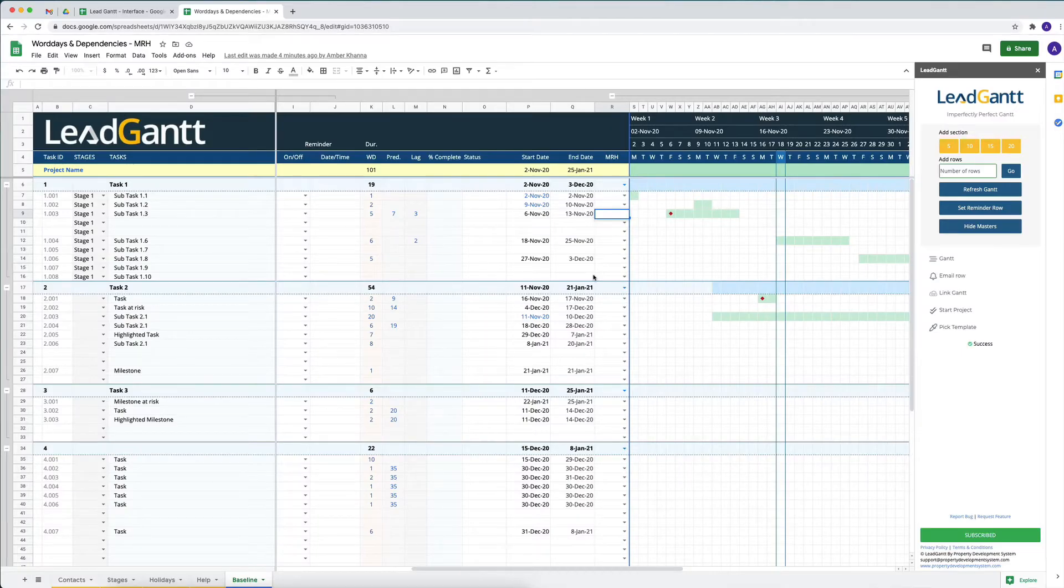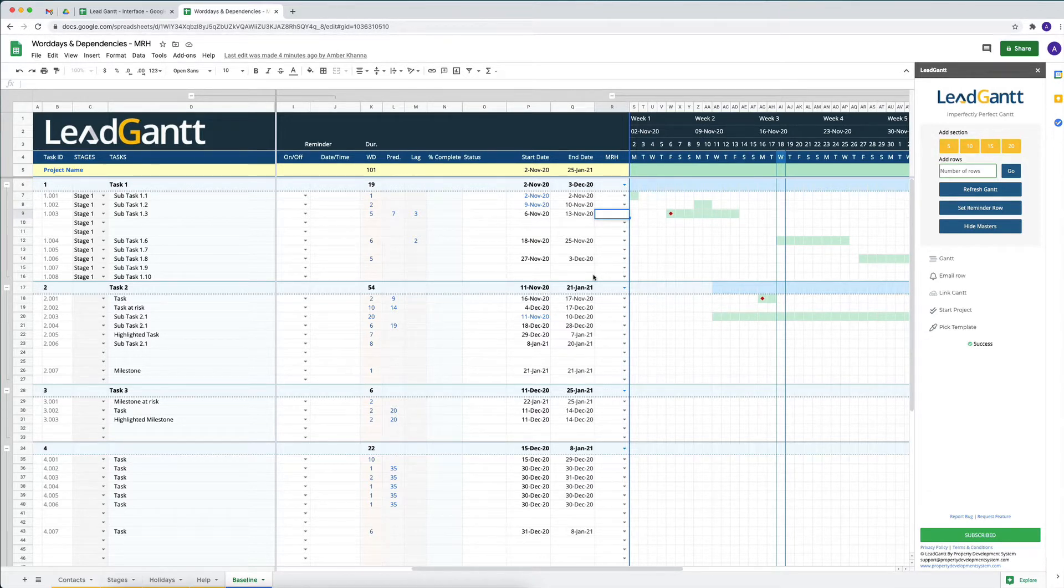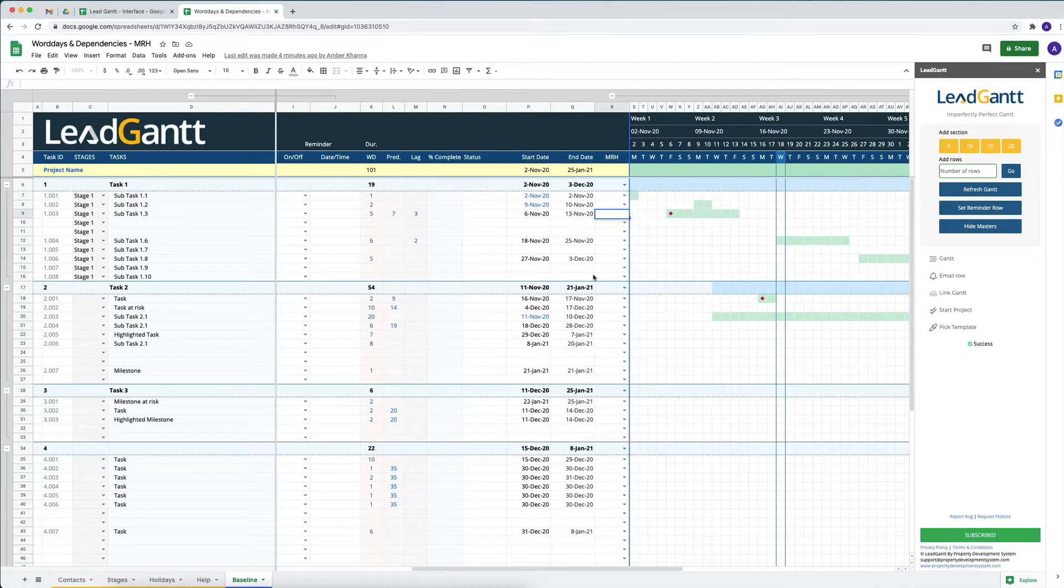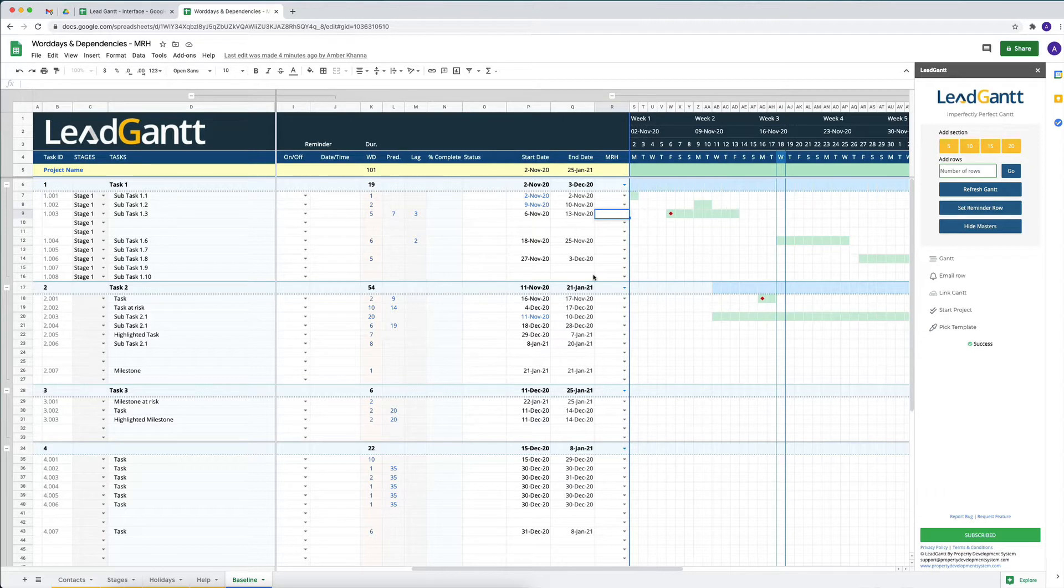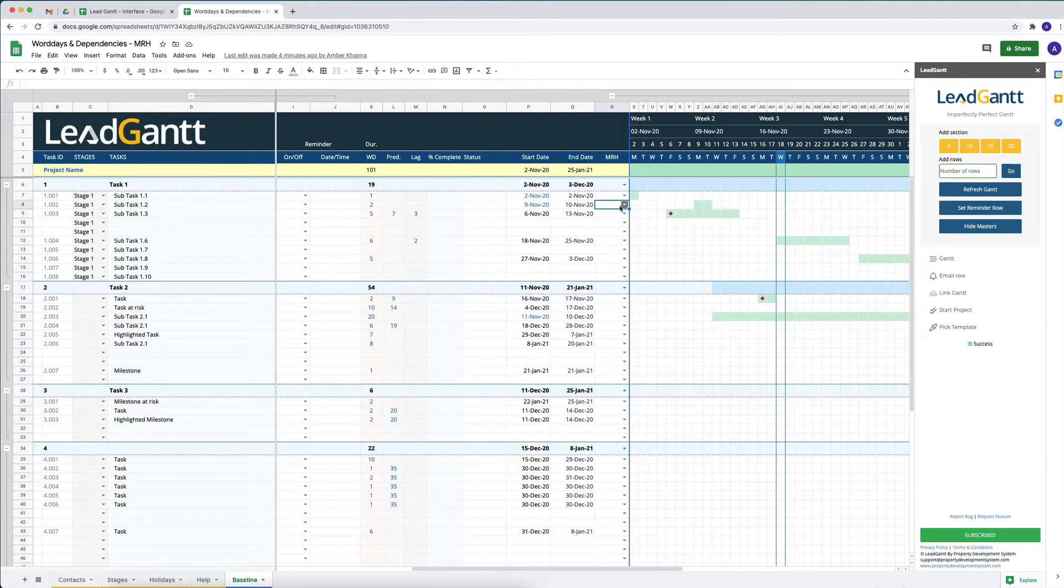When we are running a project with a team and we want to highlight a certain task that needs attention, or we want to mark a task that's at risk, or we want to mark something as a milestone, how do we do that? In LeadGantt we've got this column that says MRH, and all that means is milestones, risk, and highlights.